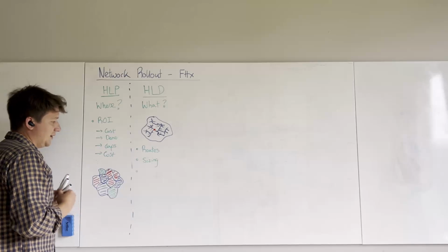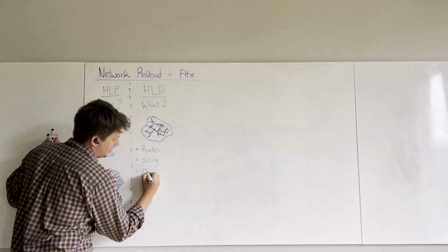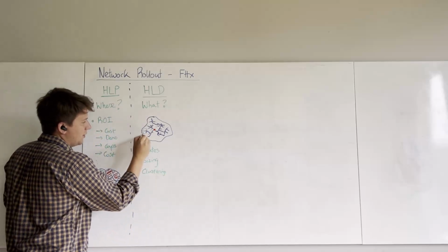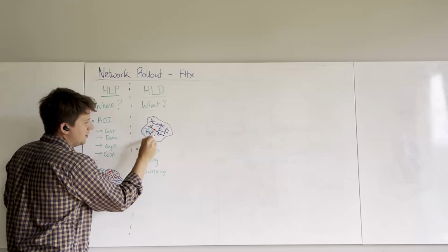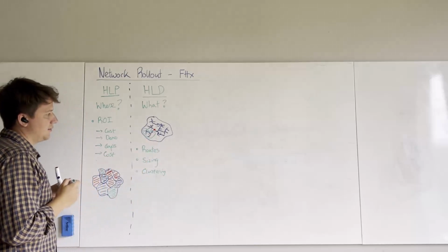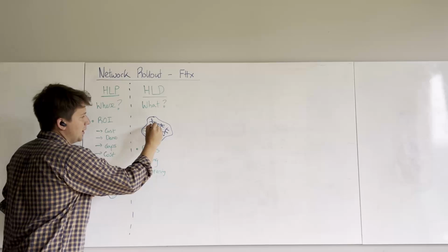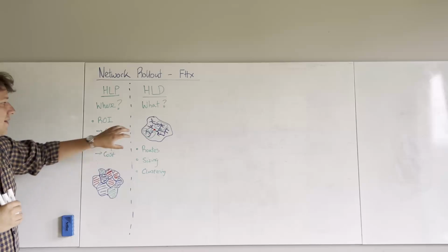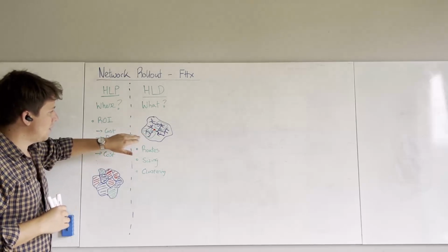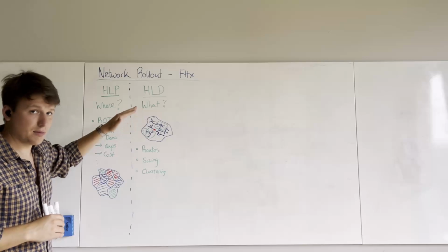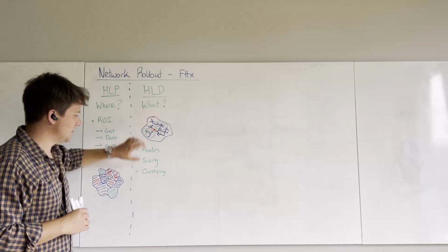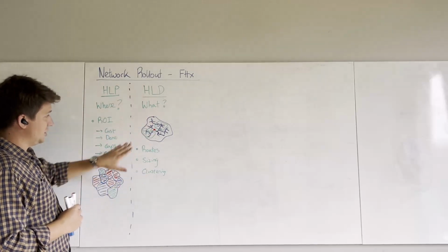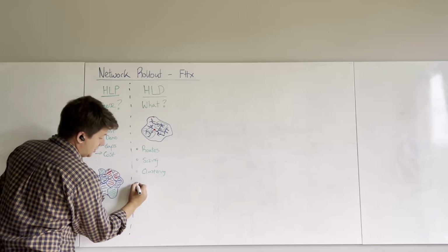We'll also typically in this phase, a lot of people talk about clustering as well. Clustering is just saying these 3 houses have been served from this drop node, these 3 houses have been served from that distribution node. We might group these 5 or 6 together. It's important to understand that, so maybe not the final drop to every single premise, but you understand the groupings as well. So you start to get a feeling for what this network in this region might look like. And that informs 2 things.